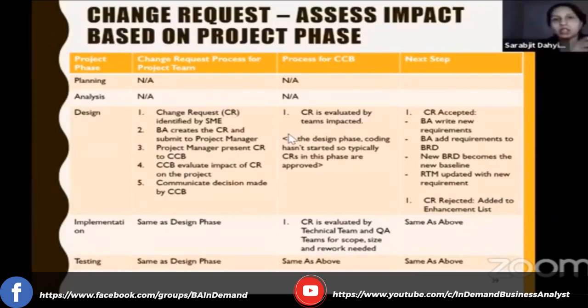The product backlog is where you have all of your requirements, either at a high level or fleshed out. So when a change goes into the product backlog, you work with your product owner to prioritize everything based on everything that's on your product backlog. You prioritize what's important, and based on the importance of what you just added and everything else that's already there, then you move those work items into each of the sprints. Does that make sense?